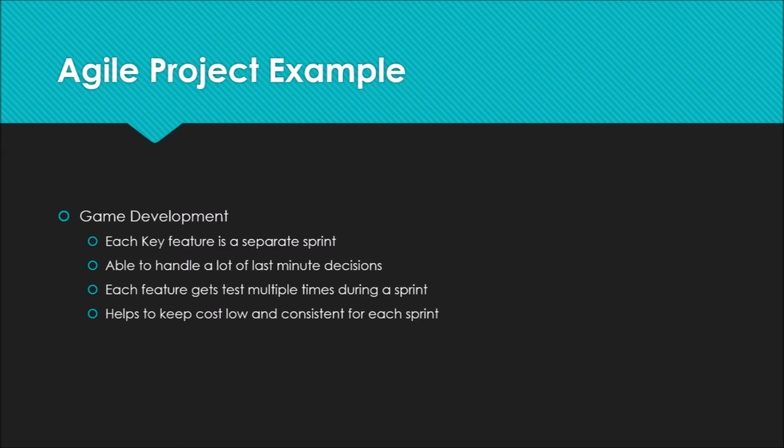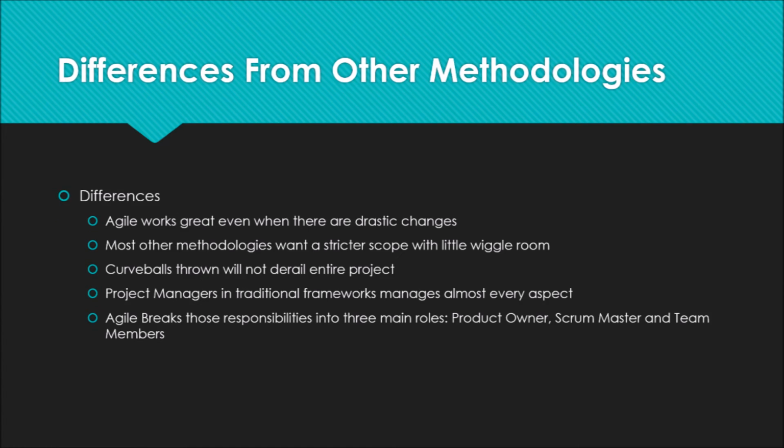Now, let's take a project where you're coding software for a customer. Agile would break the deliverable down into smaller, usable segments of code and develop and test them in more manageable 2 or 4 week sprint cycles, for instance. That way, if a curveball is thrown in part way, your entire project isn't on the line. Maybe just one cycle that can be fixed a lot quicker than the entire project.